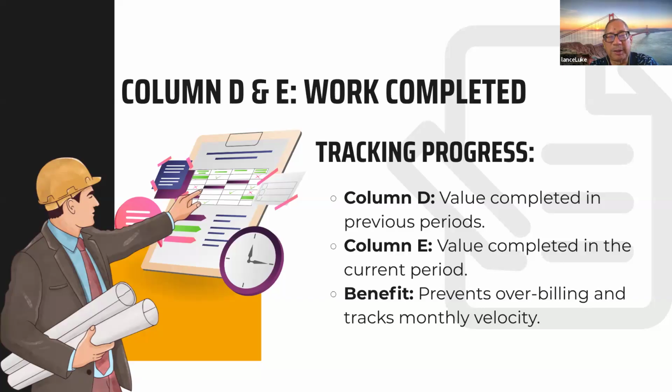Was it an approved change order, right? Sometimes the answer is yes, sometimes no. And that's where you've got to bring out the magnifying glass and ask questions: who approved this? Oh, the owner came by one day and said he needed this bigger, so we just did it. All right, that's fine and good, but where's the backup documentation? Do you have a signed change order for that, or some kind of email verification that the owner approved that and actually agreed to the price?